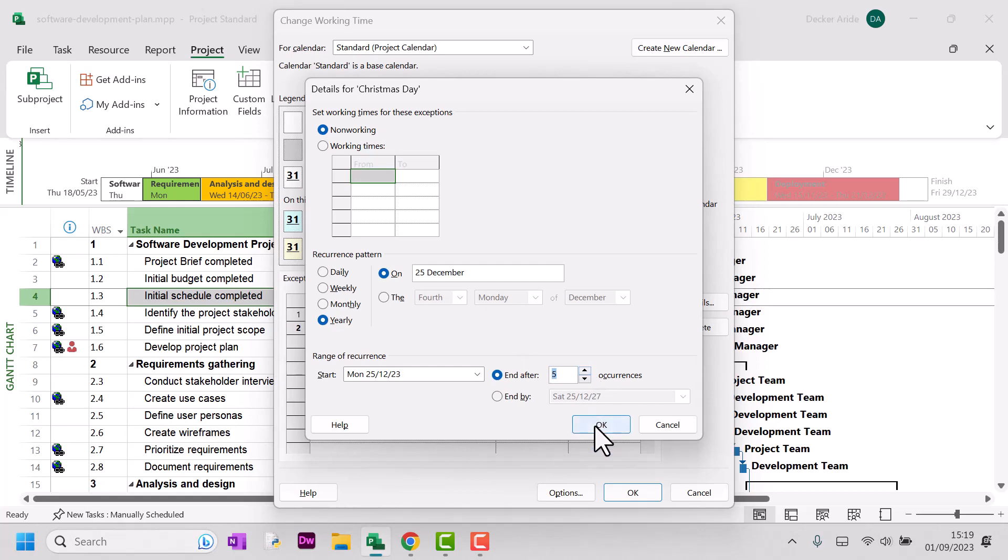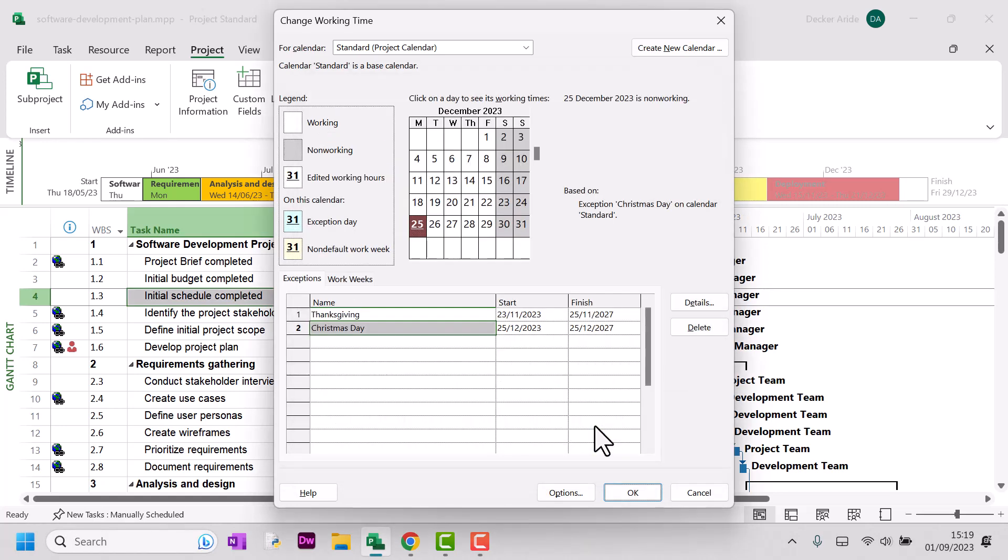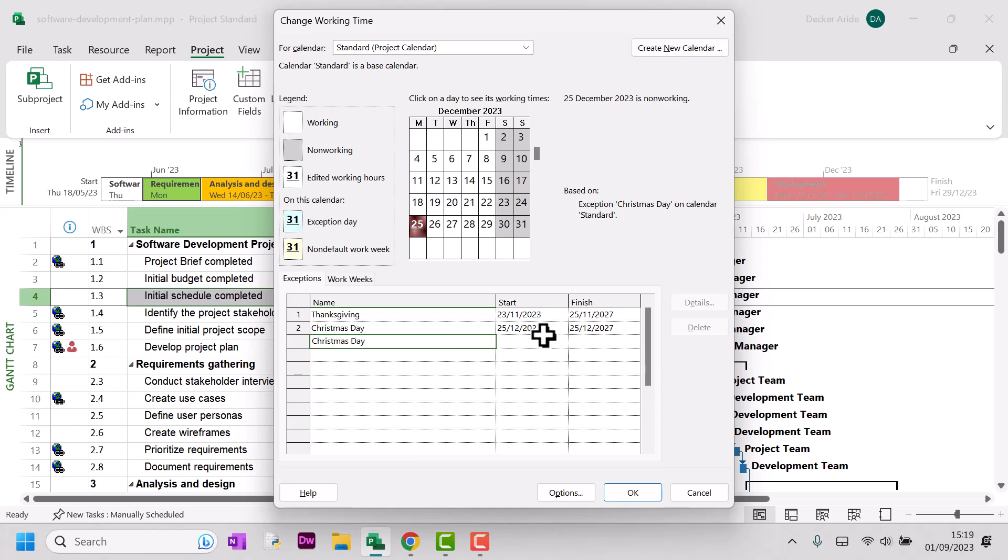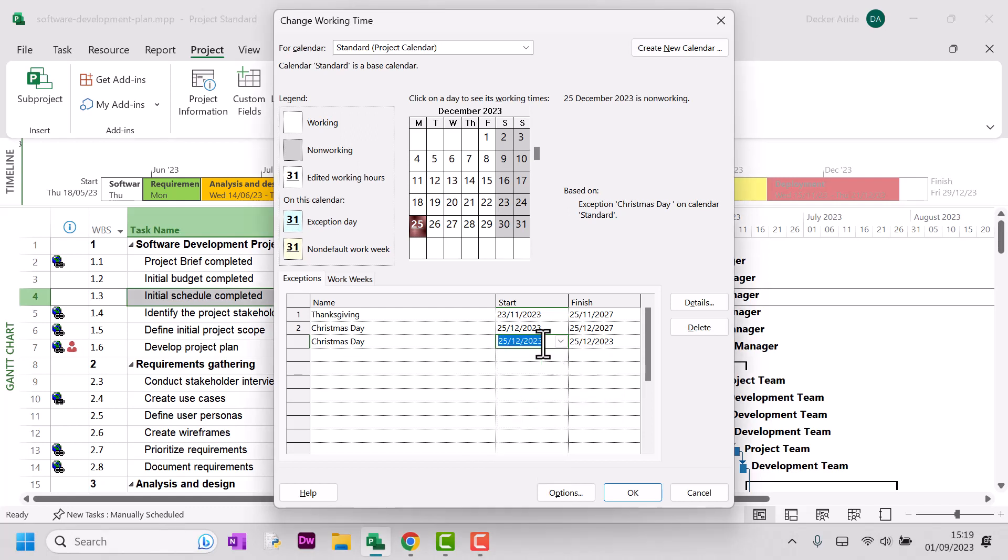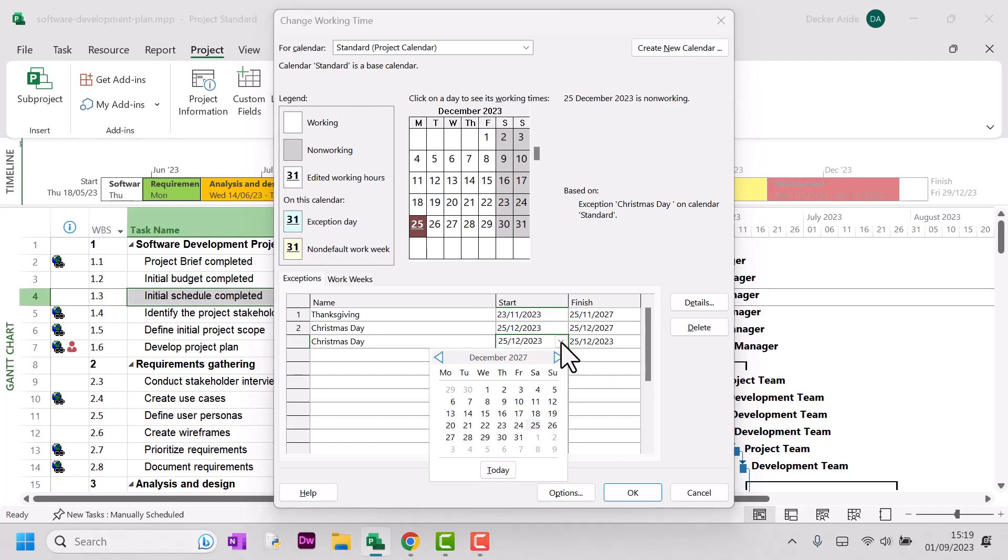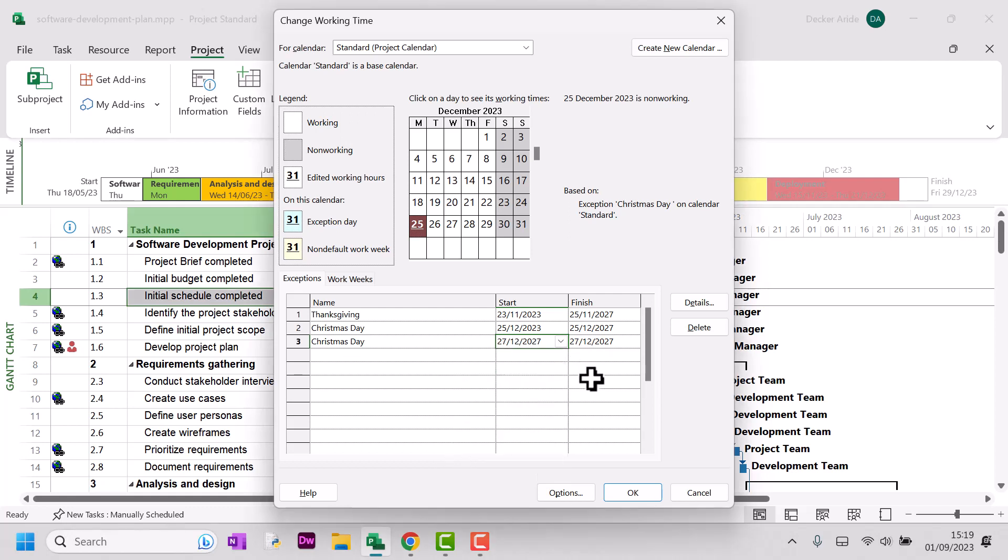And then we need to set up an exception because Christmas Day in 2027 is actually on the 27th of December.